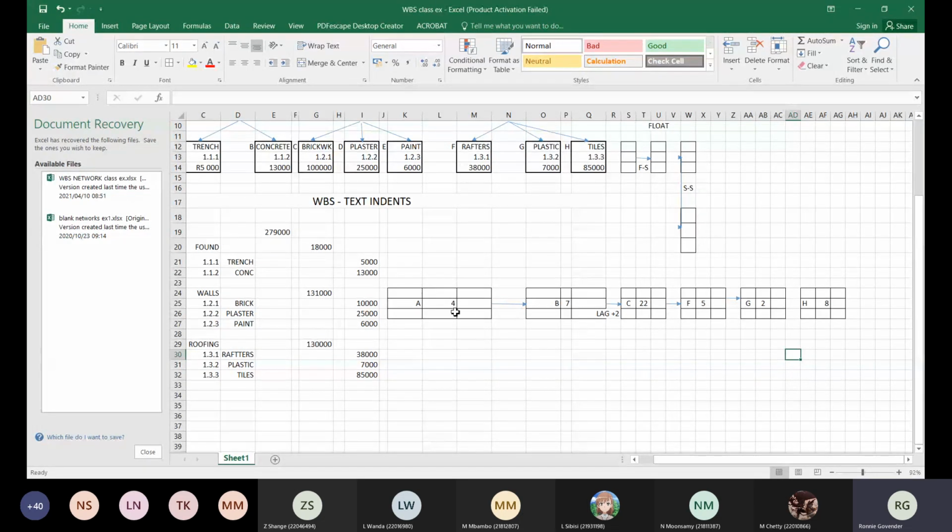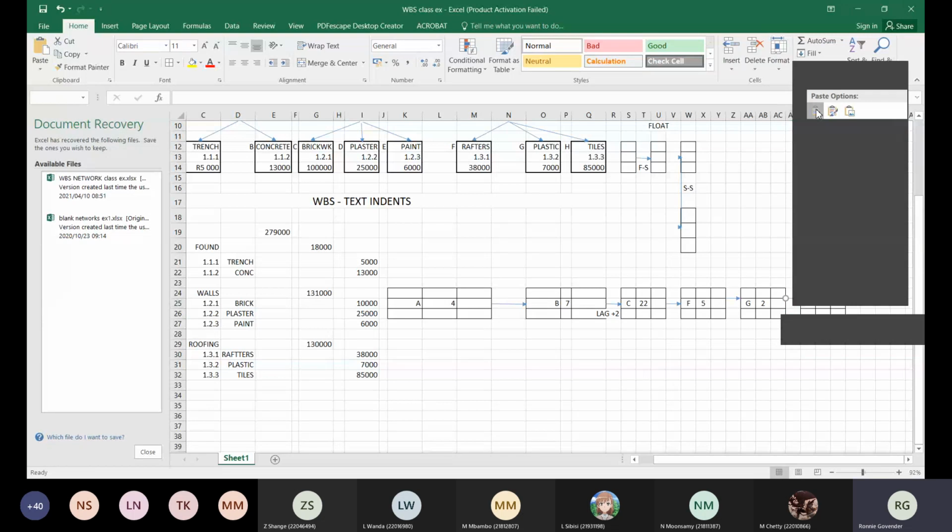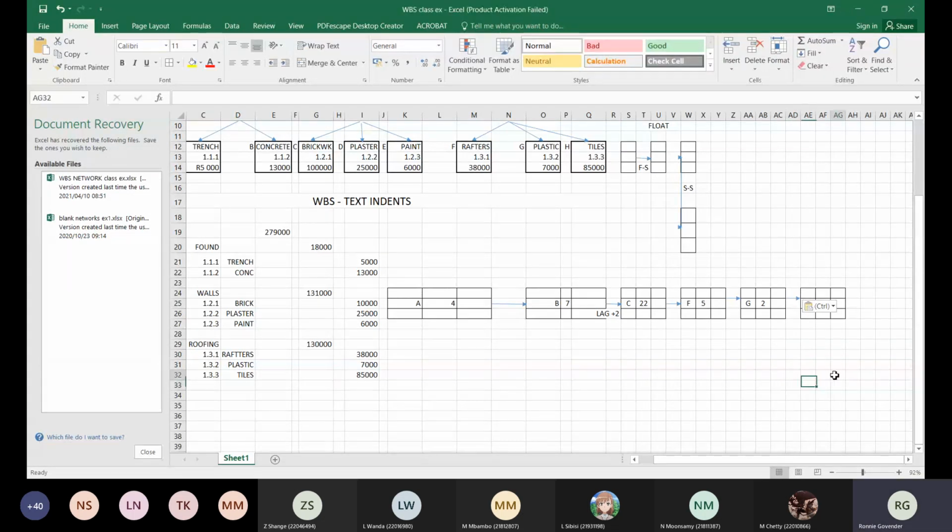Now, although this network diagram that I'm referring to is not to scale, it doesn't have to be to scale, but we show some form of timeline from left to right. I mean, in other words, early activities will be to the left. As you're going to the right, they start later in time, later on in the project. So I said we got H, which is now the tiles that's going to go there.